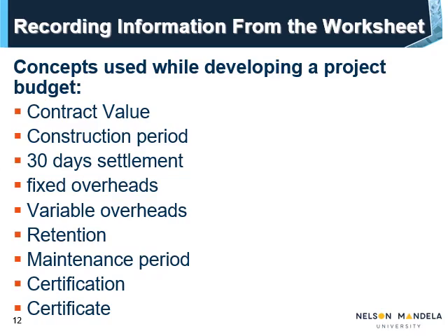Maintenance period, this is a period, after the completion of a contract, within which the contractor must rectify any items found to be defective at the final inspection, and which has been recorded on the defects liability list, or snag list. Certification, this is an activity whereby the client's representative, usually the quantity surveyor, confirms that the work claimed to have been done by the contractor is confirmed, and due for payment. Certificate, this is the document confirming the claims for work done during a certain period.